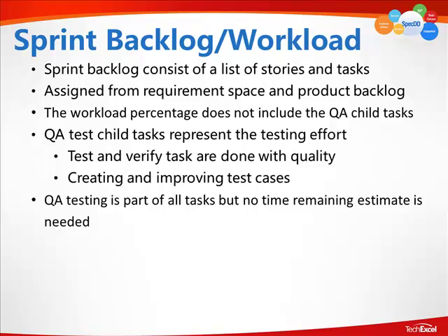So the sprint backlog consists of a list of stories and tasks. It's assigned from the requirement space and the product backlog, just like I mentioned. The workload percentage, though, for the sprint backlog does not include the QA child tasks.